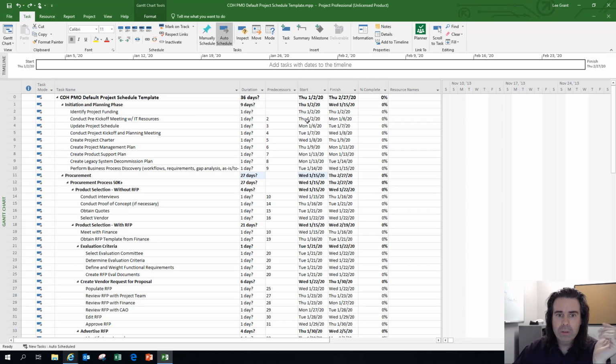So you'll know that finish to start is the most common relationship. That means task A has got to finish before task B can start. And for the purposes of this assignment, that's all you need to consider. All the tasks by default are already linked. So is task 0 here? Is this a task? No, it's not. It's a summary task. So don't consider it when you're creating the relationships between tasks.